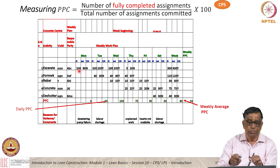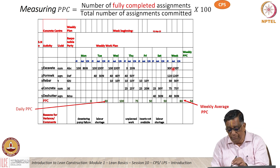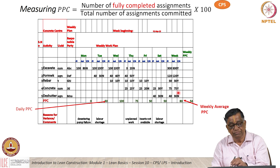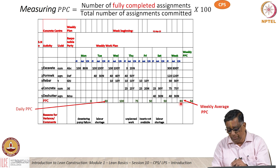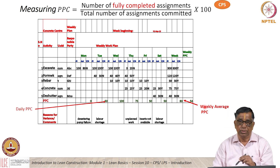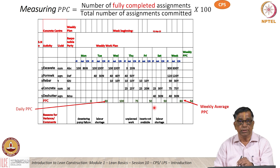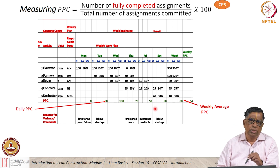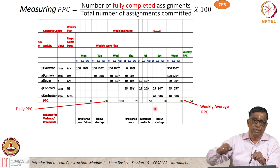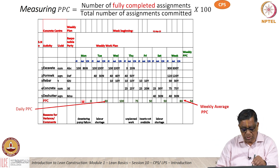Every day we see whether we have met the targets or not — Y means yes, N means no. We count the number of Ys at the end of the week divided by the total number of activities and work out the percentage. For example, here we got 80% as the weekly average PPC. We can also measure PPC every day; these daily PPC numbers give an idea of the variation across the week — am I being consistent, or performing well on one day and not on others?